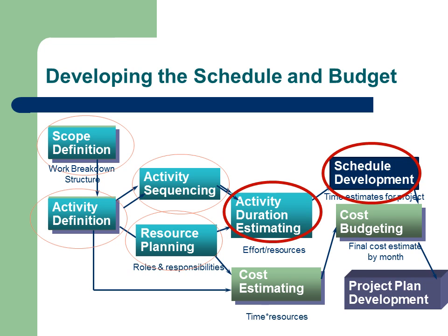Now that sequenced activities, resource allocation and activity durations are defined, a schedule can be created. A schedule is created through allocating start and finish dates to each activity, normally using special software such as MS Project. At this time, the schedule can then be adjusted to meet any predetermined milestones or resourcing constraints.